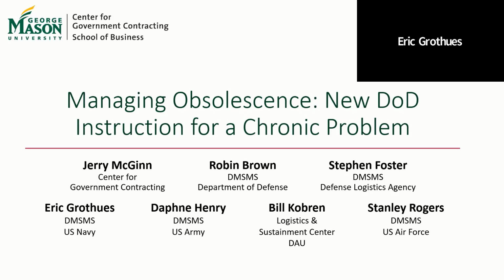One last thought that I have is that DMSMS management needs to be a joint effort between the program office and the contractor. One side can't do it and be successful without the other side. To plug one of our other products that Robin led, there's SD26, which is a DMSMS management contracts guide. It's a real good document. I've been using that with some of our new programs, and getting the right contractual requirements, bids, and procedurals up front has been really key. And I think that's one of the key thoughts too: if you start that process early, getting those things on contract will make you successful.